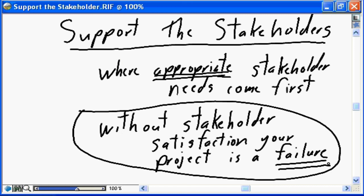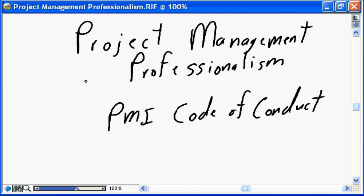You say to the stakeholder: 'I understand your business requirements have changed. I understand the economic environment has changed. I would be happy to change the project from X to X-prime or Y. Here is the impact to project scope, time, and budget — if you approve this, I will continue.' And if the stakeholder says there is no money to approve the change, you stop the current project. Where appropriate, stakeholder needs come first — as long as it is ethical, does not violate project management professionalism, and you execute integrated change control.